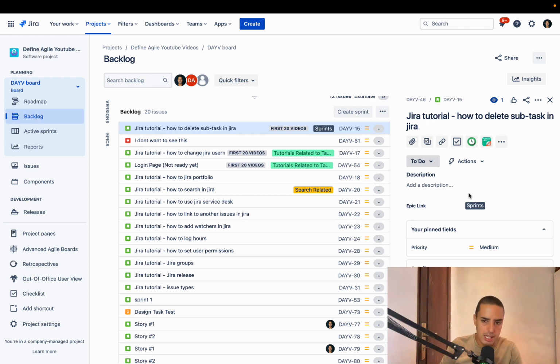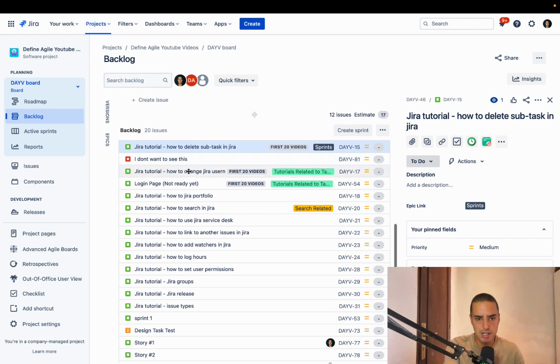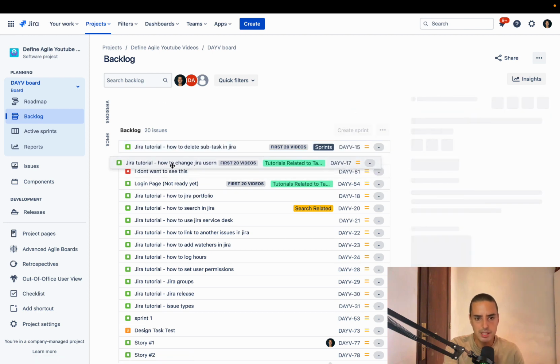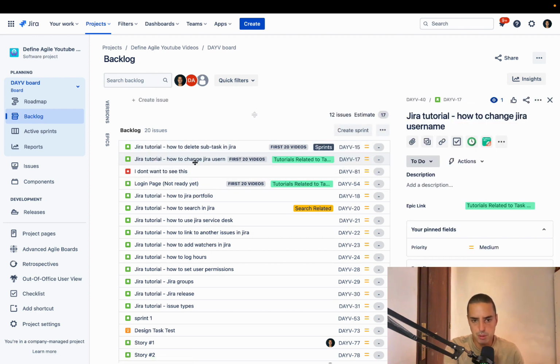So the grooming session is, you're taking the issue, you're seeing what's missing, and you're finding those missing links, and then you're putting them in the ticket. You can do it with the developers if you need developer input. You can do it with designers. You can do it by yourself as a product owner, project manager, or whoever the role is for maintaining the backlog. But you always make sure that the top of the backlog is groomed. And when it is groomed, it's great. Then it's at the top. And then you reshuffle, you see what else is important, asking questions, what are we going to work on next, talking to stakeholders, talking to your developers.